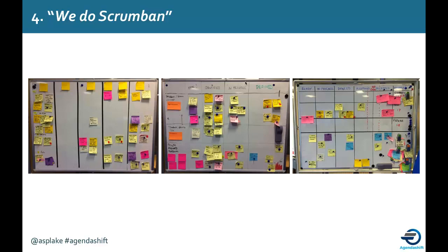One of the ironies here is that in some ways the left-hand board is more a Kanban board than the right one, in as much as in the left-hand board we pay close attention to capacity, to how much work we want to commit to in a sprint, and that's not at all visible in the second board. The second board does visualize a process, but it doesn't apply any controls on work in progress. The right-hand board we could have an interesting debate about whether it's a Kanban board.